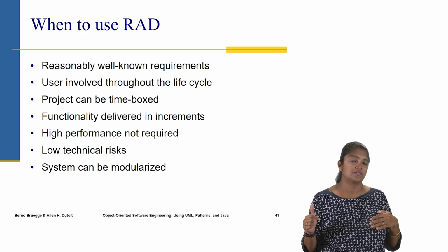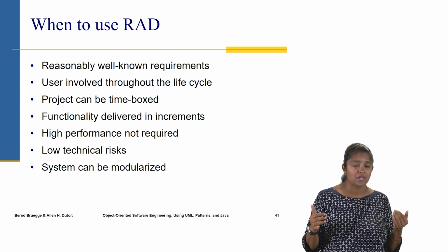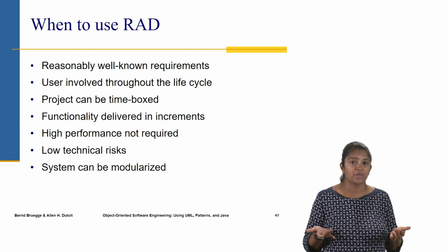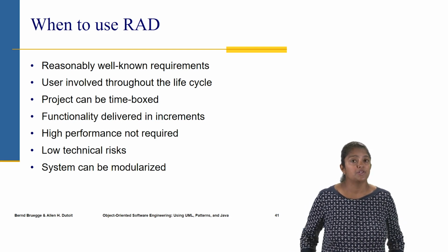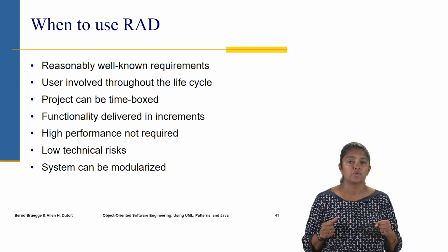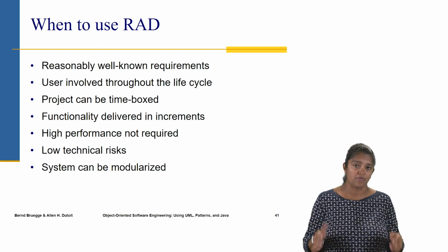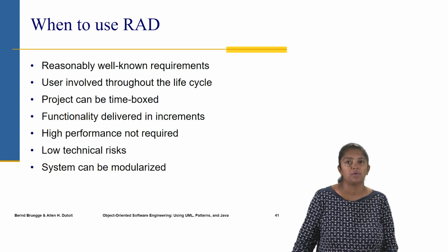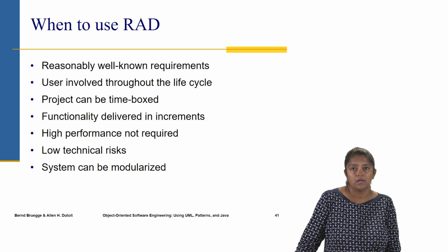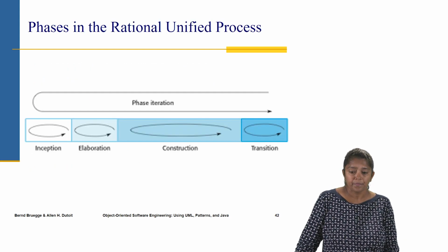There are no activities related to software quality and testing, so it's not for high performance products. There should be low technical risks associated with the software that's being built, and the system should be such that it can be modularized. That's when RAD can be used.